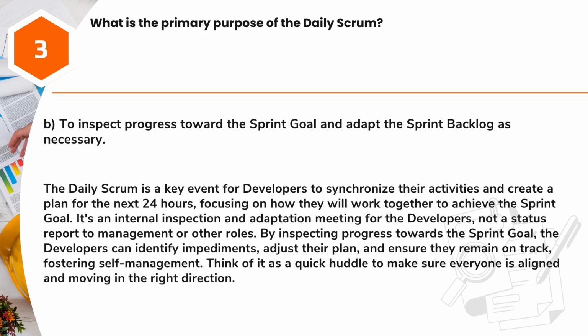By inspecting progress towards the sprint goal, the developers can identify impediments, adjust their plan, and ensure they remain on track, fostering self-management. Think of it as a quick huddle to make sure everyone is aligned and moving in the right direction.